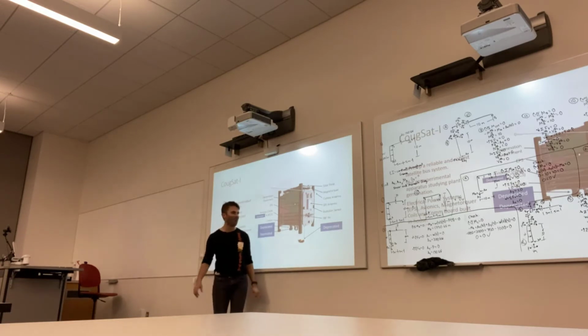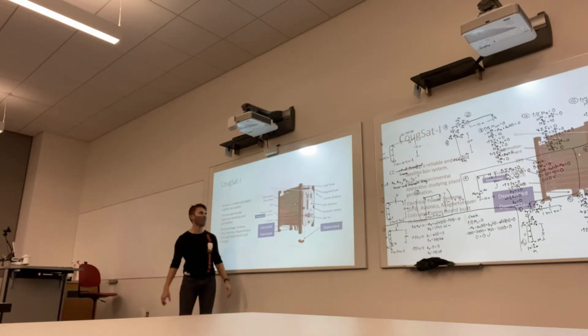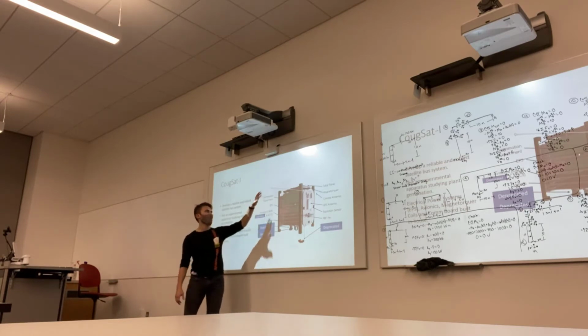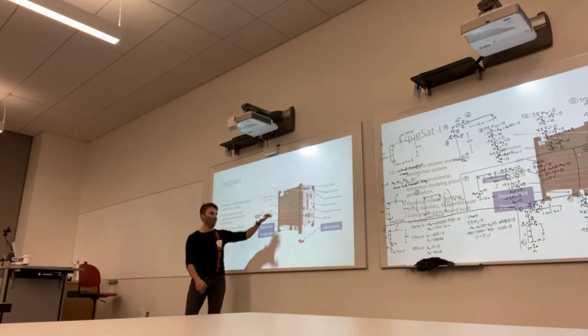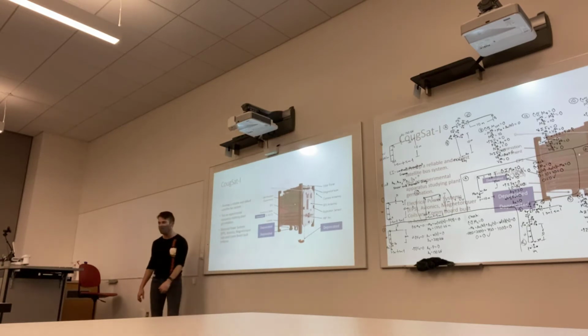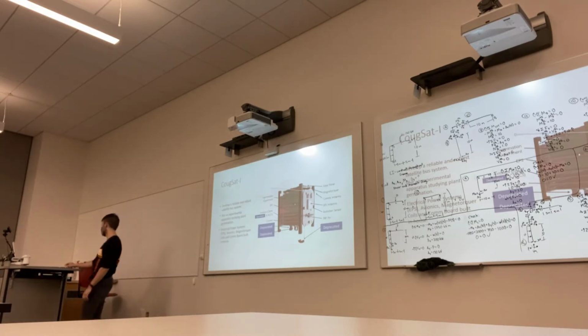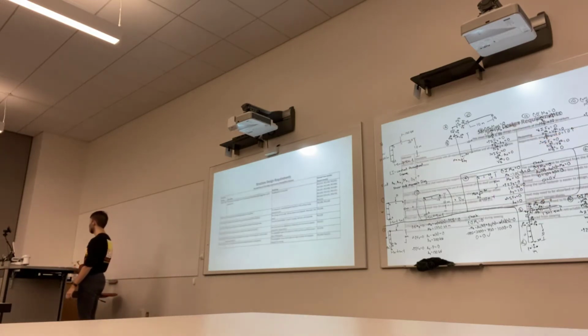You get a lot of clout from all the alumni. But that ended up being a little bit more involved, especially when you had the requirements creep that you did for the first, you had a germination chamber, you're making everything from scratch. So one lesson that was learned is when you're making a mission, stick to one, possibly two payloads, and don't try to invent the whole wheel from scratch as much as possible, because it's going to be a lot to chew. So that's CougSat-I, a little bit of the overview of all the systems.